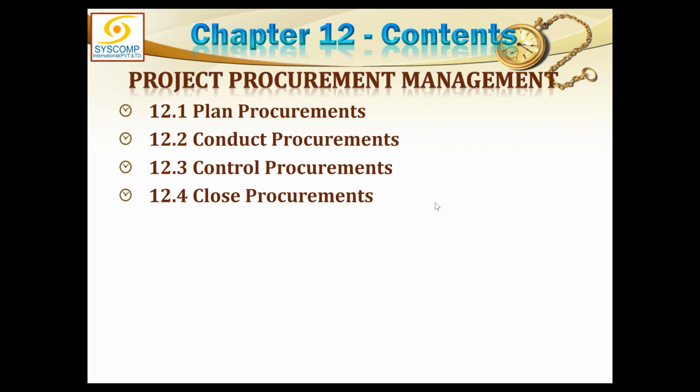First of all, in the planning, we establish which is that work of the project which we cannot do due to certain reasons. There could be three reasons, as I defined earlier also. Number one, you do not have the capability to do some work, so you decide to outsource it. Number two, you do not have the capacity to do some work. You know how to do it, but you do not have enough resources to do it. Therefore, you decide to outsource it.